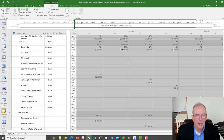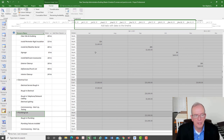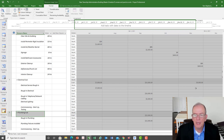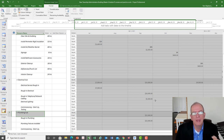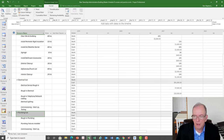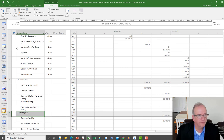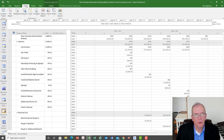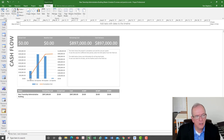Laborers show money spread across activities on a monthly basis because they're prorated — they work for me. On the other hand, the electrical sub, set to pay at the end of their activities, shows spotty payments coming out when they're billing me for work performed. That's the way it should be. I could monitor this in a very granular, detailed way, or I could go to the Report tab, select Costs, and look at the Cash Flow report.